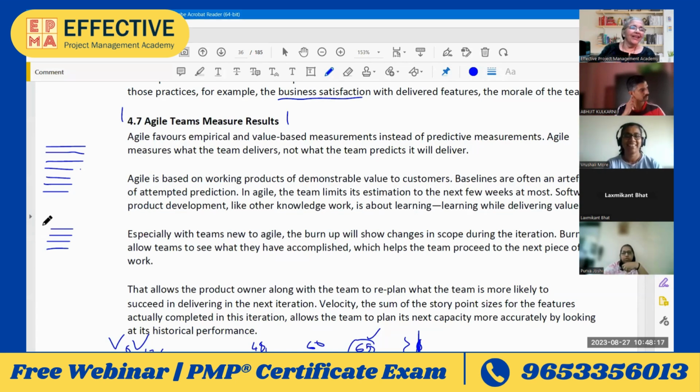Okay. So out of these 4 stories, they want to check whether they can do it in one iteration or not. What they have to do is find one story. If it is not there in these stories, they can take one additional story only for judging this. They may not finish or start work on that story, but they have to find one story which they can finish together in one day's time, end to end, including testing and everything.